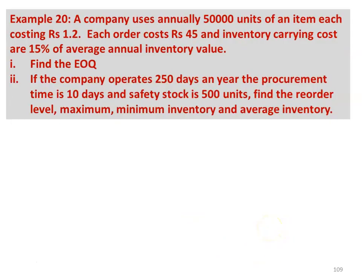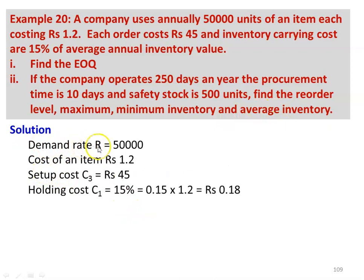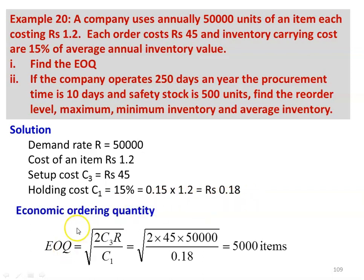Example 20: A company uses annually 50,000 units of an item, each costing rupees 1.2. Each order costs rupees 45 and the inventory carrying cost is 15% of the average annual inventory value. Find the economic ordering quantity. The company operates 250 days a year, procurement time is 10 days, and safety stock is 500 units. The holding cost C1 = 0.15 × 1.2 = rupees 0.18. EOQ = √(2 × C3 × R / C1) = √(2 × 45 × 50,000 / 0.18) = 5,000 items.